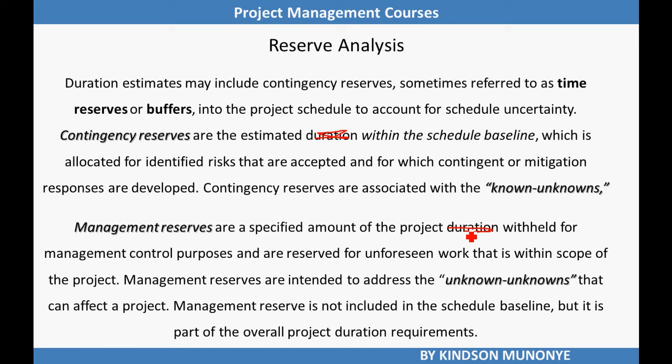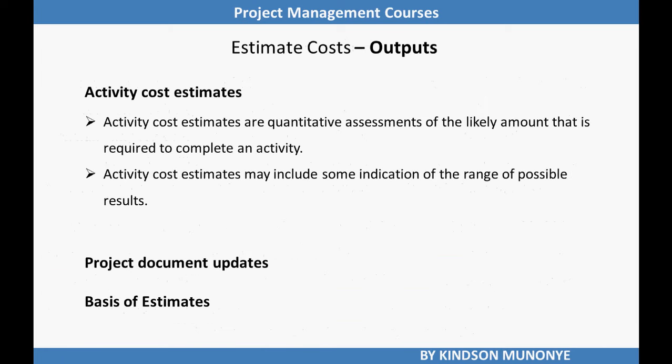Let's move into the outputs of estimate costs. There are three outputs. Activity cost estimates are quantitative assessments of the likely costs required to complete an activity, and may include an indication of the range of possible results. Basis of estimates provides supporting details that may include assumptions made, known constraints, indication of the range of possible estimates, and the confidence level of the final estimate. The third output is project document updates.